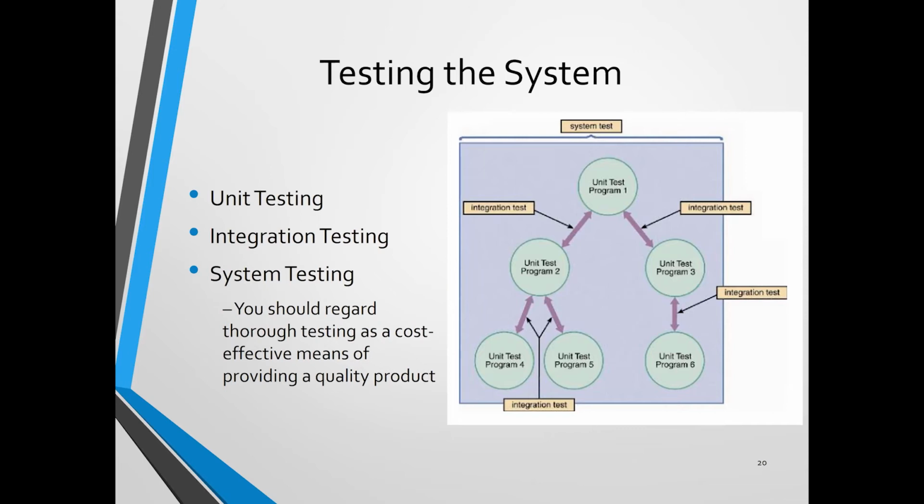different modules together. What about the interconnectivity of the input and output from one module of one program to another program? Do they work properly or not? If it doesn't work, or if there is still something wrong, you have to go back and fix. Once you go back and fix, you may have to do the quick unit testing once again before you do the